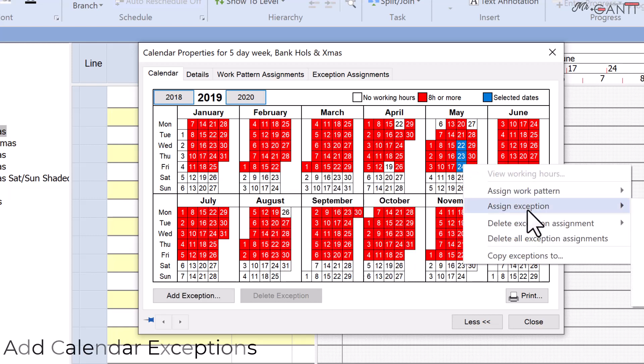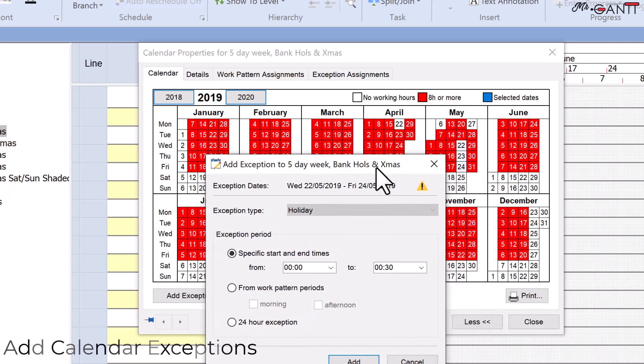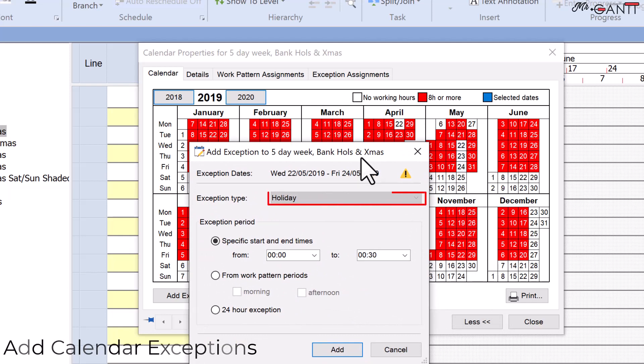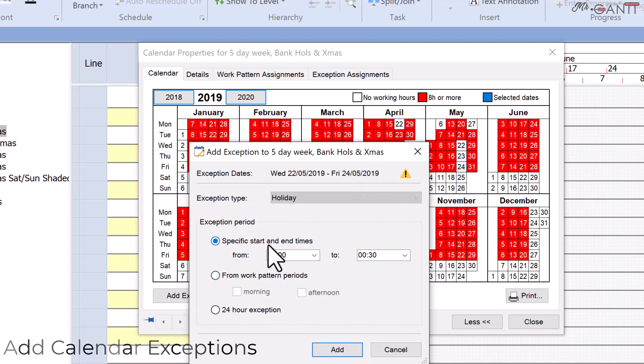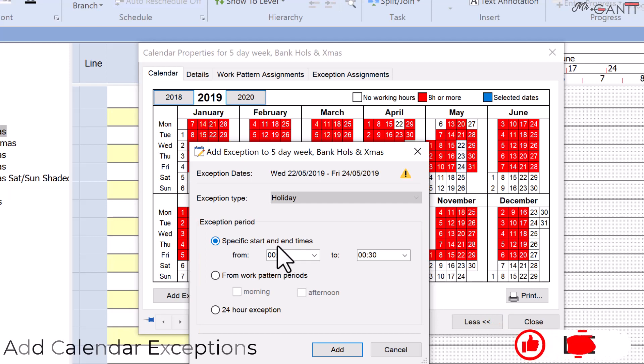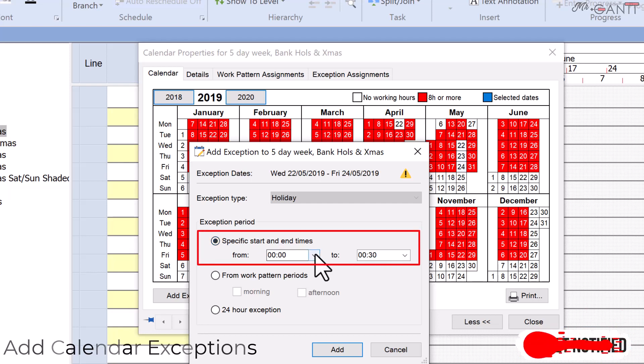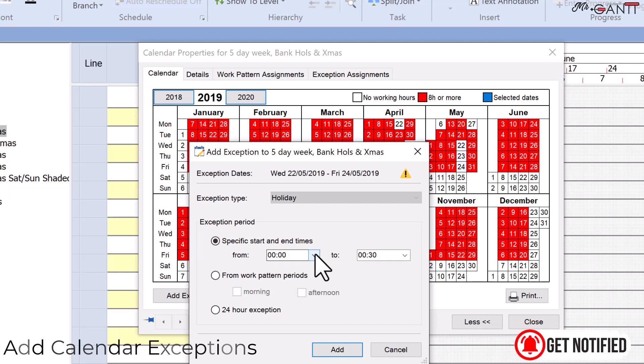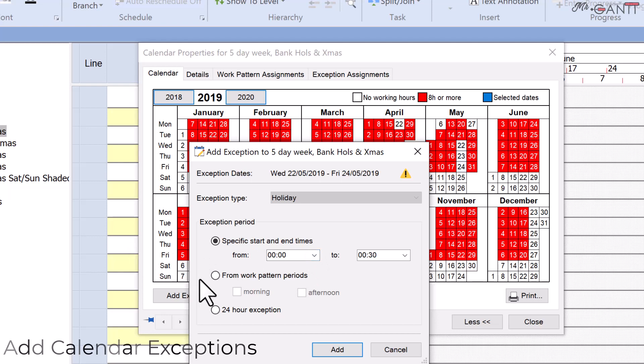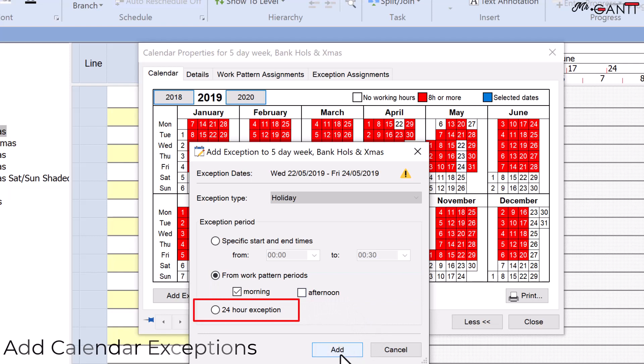Choose assign exception. The add exception dialog box appears. Choose holiday for the field of the exception type. In the exception period group, indicate the duration of the exception. You can input exact start and end timings, specify that the exception applies to the entire morning or afternoon, or specify that the exception applies to the full day. Click add.